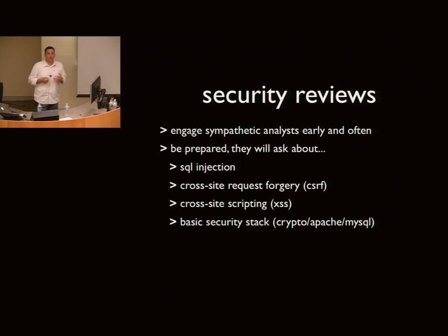They're going to have a lot of questions, whether it relates to how you're storing data, or what kind of data you're storing. And the earlier you can get them in, and the earlier you can show them anything, they may be able to save you a lot of time, versus finding out 3 days before implementation. But be prepared. They're going to ask you a lot of questions about specific hot topic security issues.